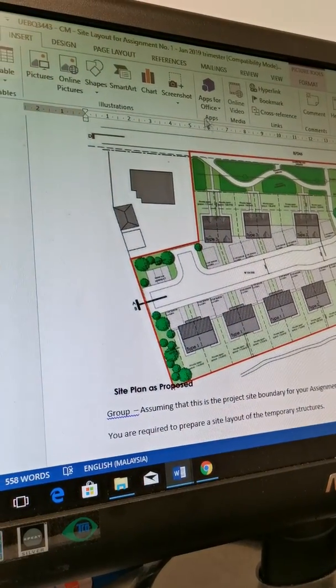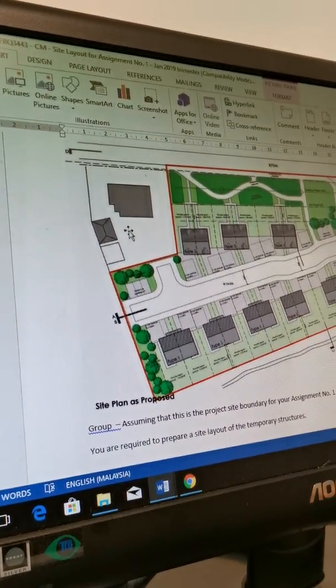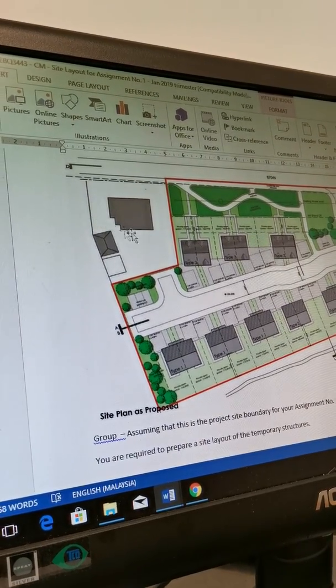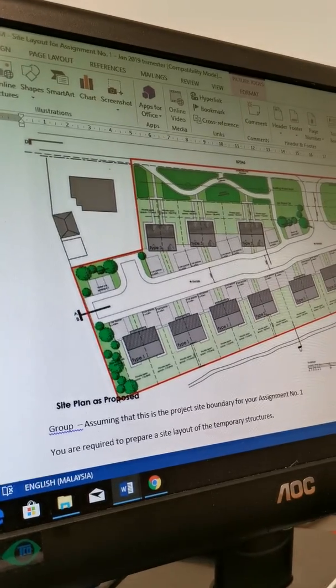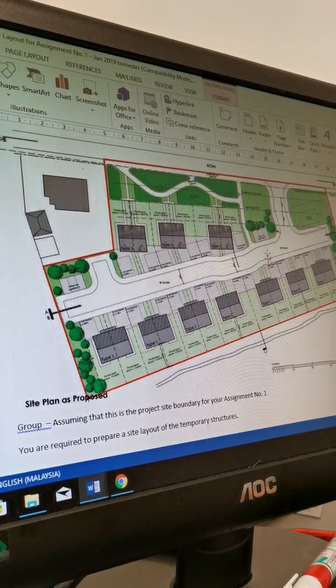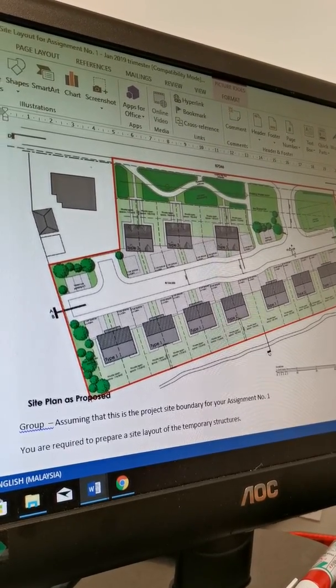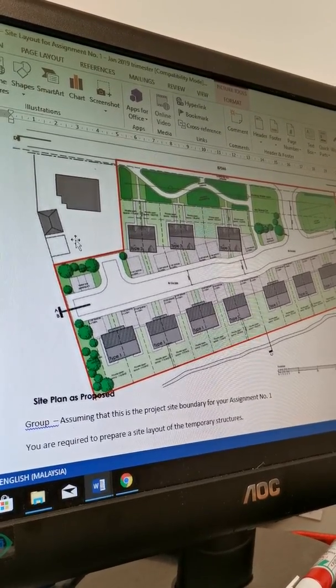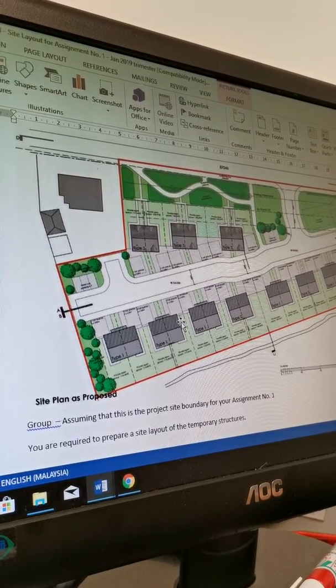No, usually you must be within your boundary. Outside, on a special case condition, you have to talk to the neighbor to rent or something. But within here is definitely fine already. This is the rule. Sometimes because of the nature of the construction it's impossible to do inside here, then you may have to talk to the neighboring one. But what I'm giving to you is every time you should have an open space for you to do.